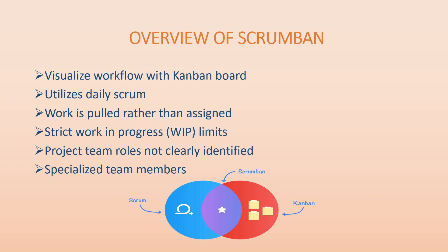Scrumban was created because if a project needs its methodology changed from Scrum to Kanban, that can be quite a drastic change — Scrum is very defined, while Kanban follows organizational policies. To avoid a drastic change that may affect the project, a smooth transition is possible: first move from Scrum to Scrumban, and then eventually from Scrumban to Kanban if desired.